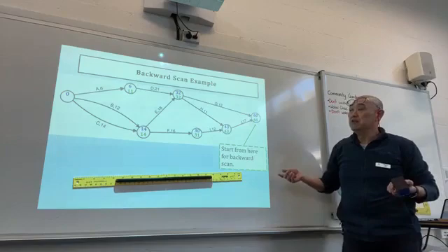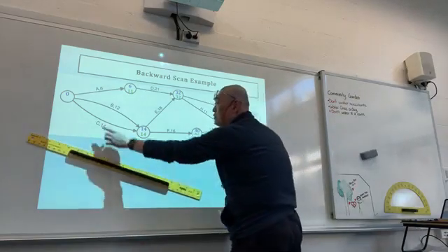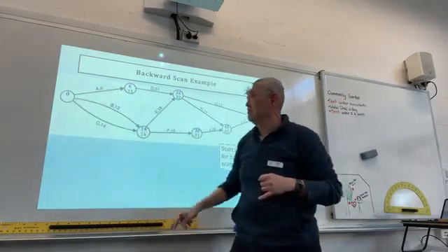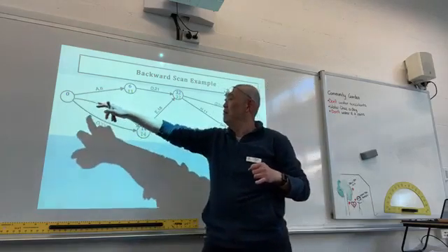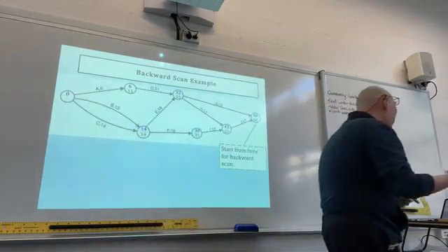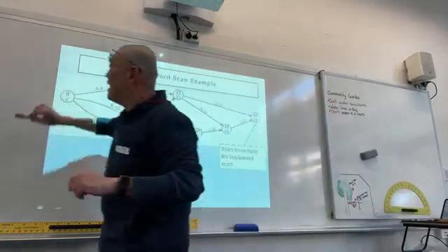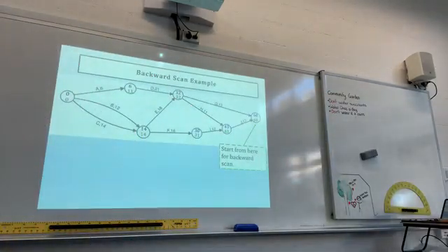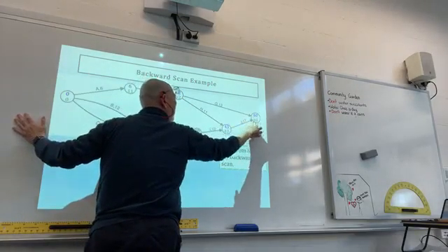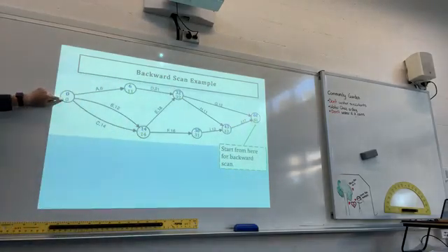Right? So now next one, all right. When we come to the last bit, 11 minus 6 is 5. 14 minus 12 is 2. 14 minus 14 is 0. So when you go back, you always must make sure that the time there is 0. So at the start of the backward scan, you've got to use the earliest start time, and then work backwards, you must end with the start time of 0.